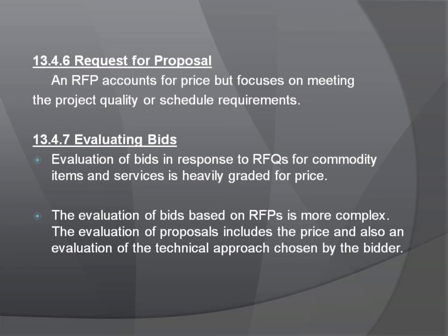The total price will include the costs of goods or services and any shipping or delivery costs, the value of any warranties, and any additional services that add value to the project. The project team evaluating the proposals must include people with the expertise to understand the technical aspects of the various proposal options and the value of each proposal to the project.